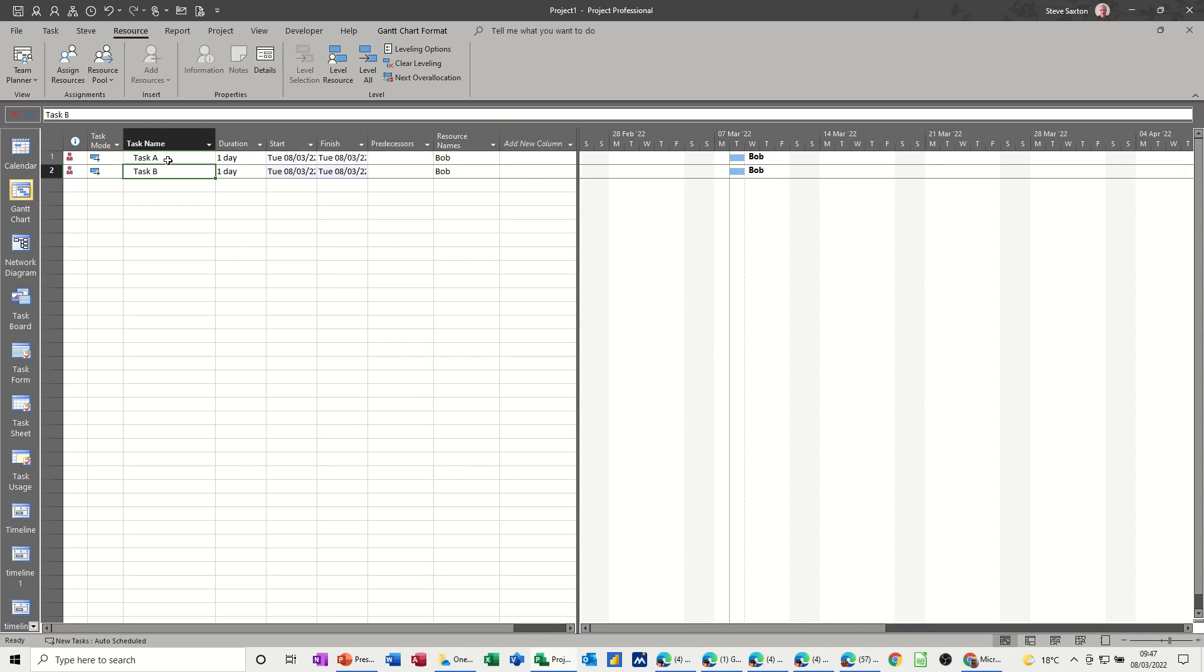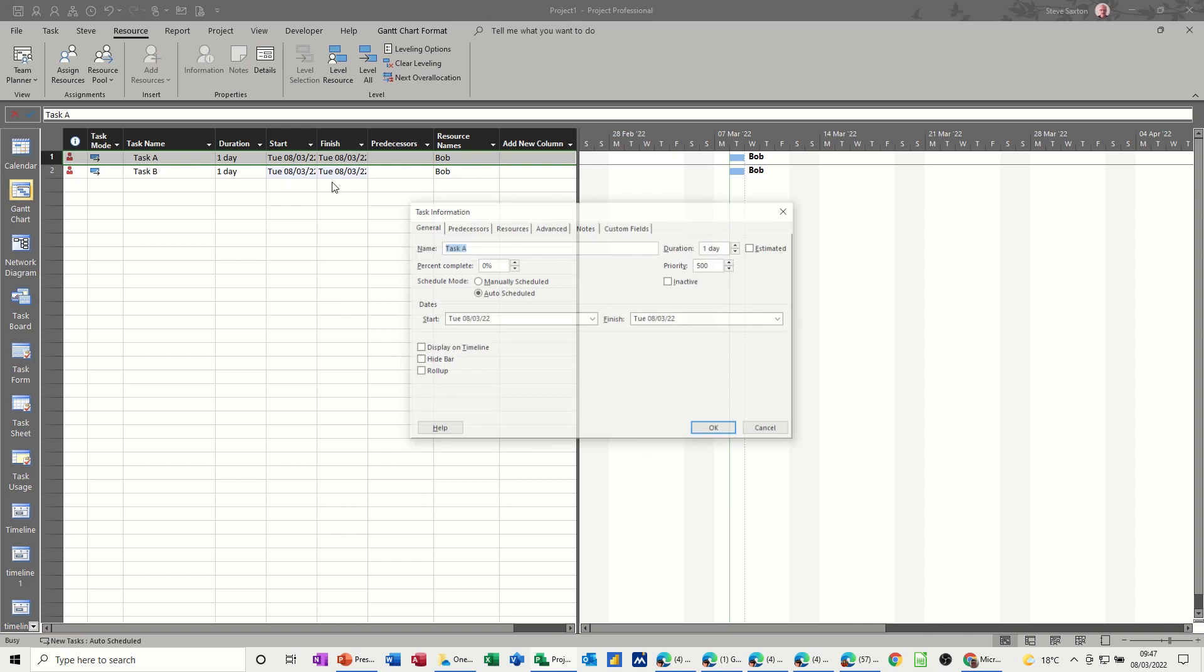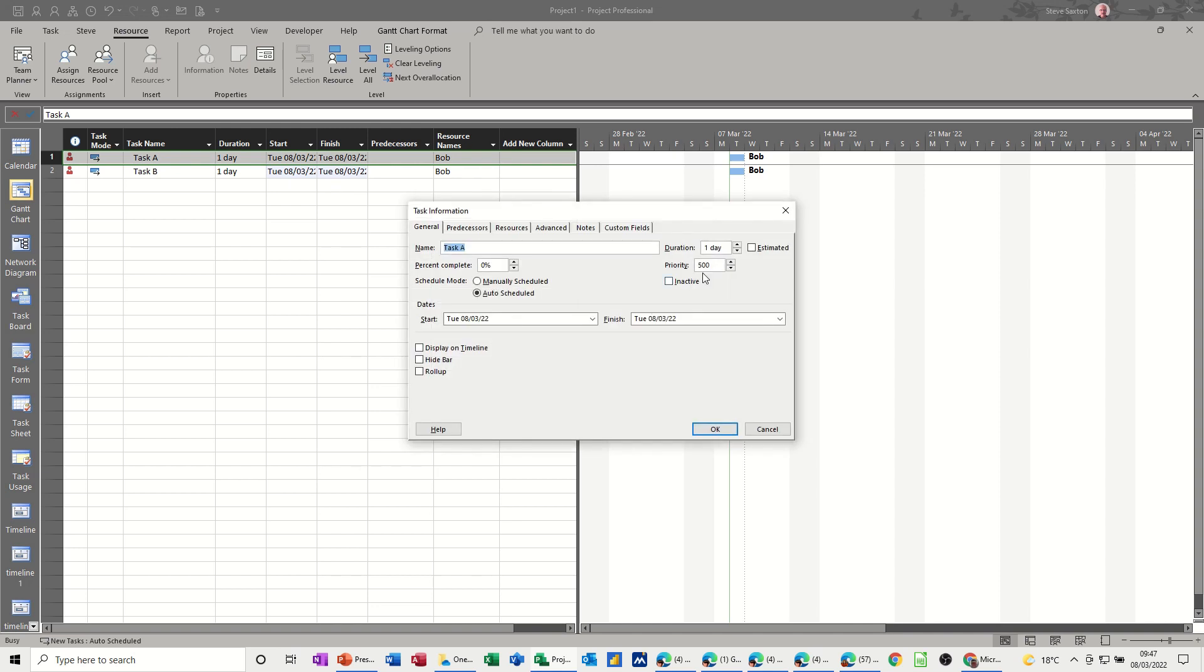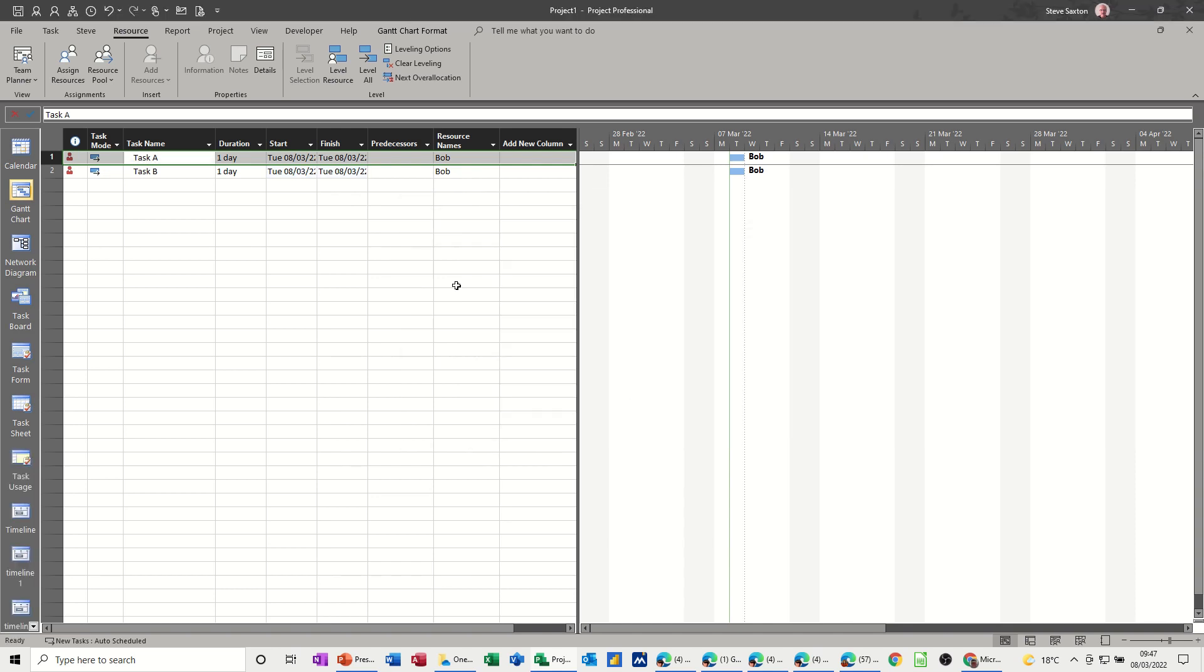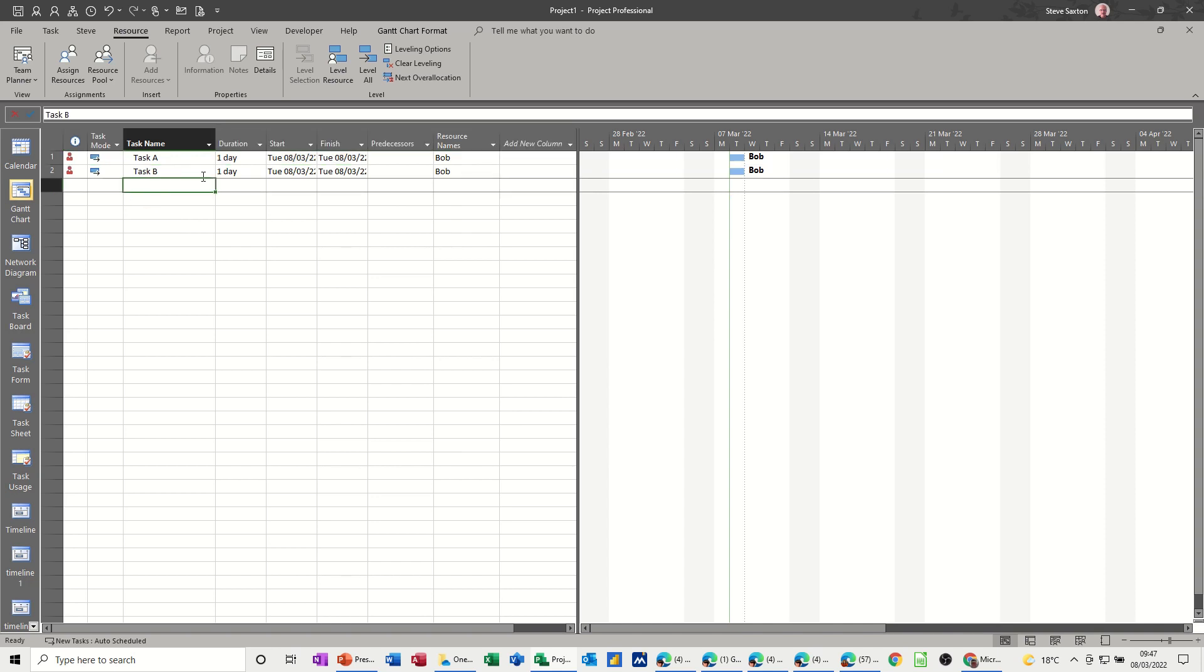Put that back to 600. Now if I put that to 1000, you're basically telling the computer not to move at all. So you might have a few other tasks with different brackets or ranges of priorities, say 600, 800, or 400. If you've got one at 1000, or a few at 1000, they're not going to move at all, because you're basically saying that is set in stone. Don't move, don't level. I'll click OK to that, and then that one is set as it was.